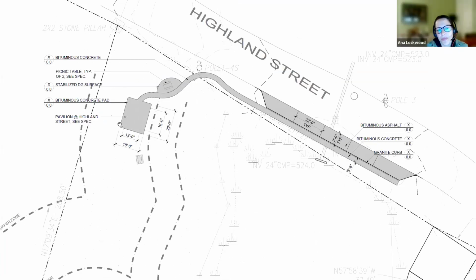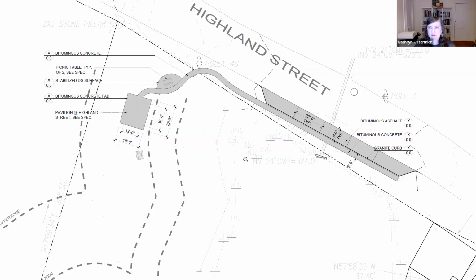Do you know the distance between that and the pond? Well, I think it's just over 50 feet, it looks like 55 feet. Good. I think they have a 30-foot no structure zone. Yeah, so this is the 30-foot. So we've worked to locate things as far as is practicable outside of the wetland buffers. Perfect. At least it's in the outer 50. Awesome, love that.